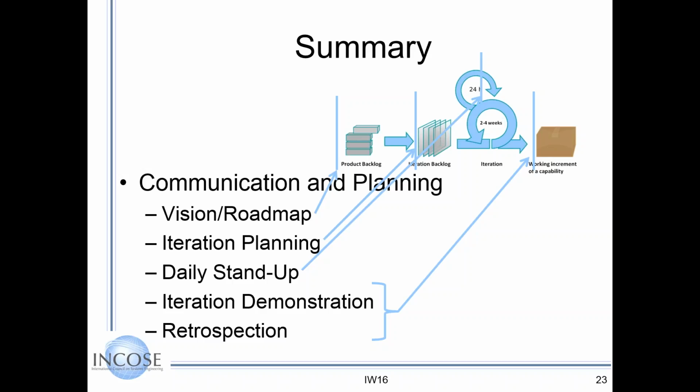Well, if you want me to do this instead of that, is that higher priority? So you work on a budget over a certain period of time, accomplishing as much scope as possible. For a while, you'll measure a velocity, and you'll be able to estimate how much you can get done before the budget runs out. And the customer can help you prioritize the highest priority work that needs to be completed. Jesse, can we return to that when we get into the discussion at the end? Important question. Yeah, you bet.